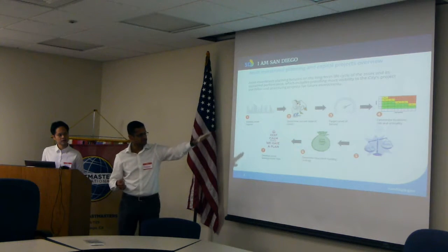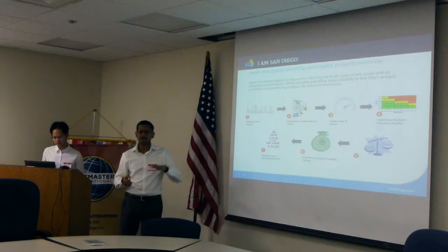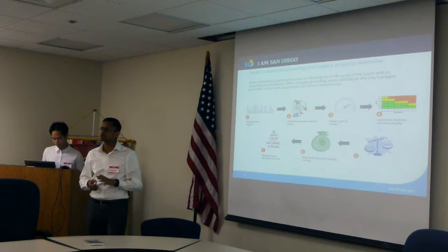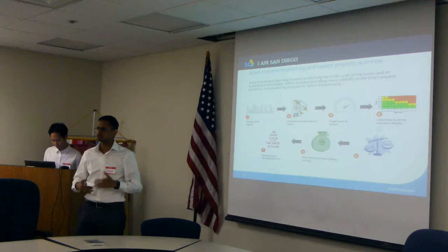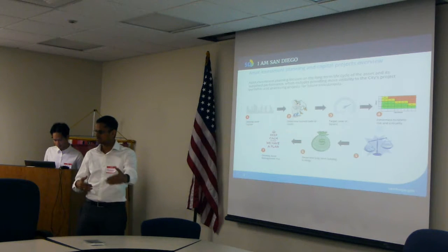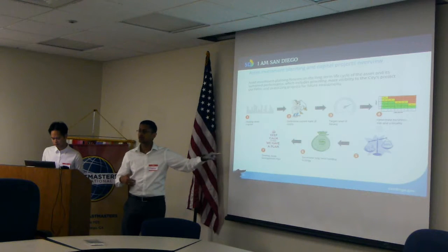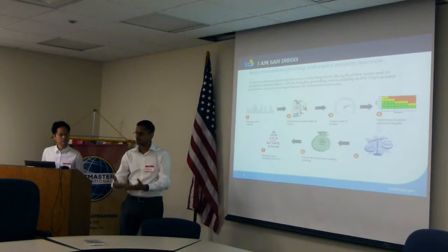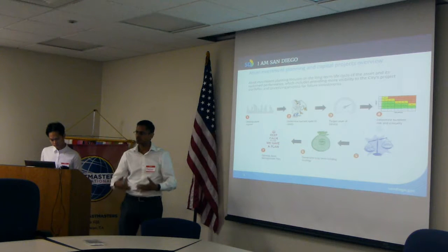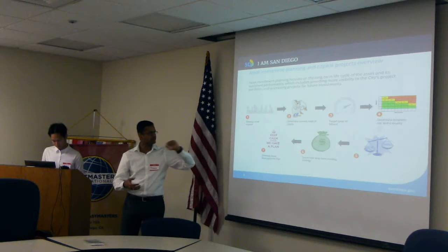When you feed all of this information in, you balance out whether this asset should be worked on this year, next year, 5 years down the line, 10 years down the line, all such things. And the cost of working on that particular asset: are we talking about replacing it, repairing it, what sort of repair, all of those things.